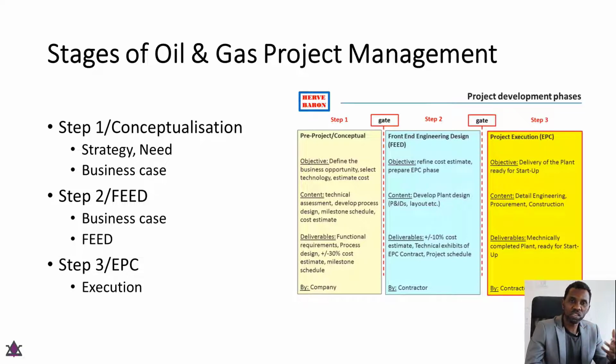There are some projects that require that you send out documents based on the FEED analysis. You send out documents for contractors to bid and send in their own proposals. So they will look at what the purchasing company has requested, and they will provide their own technical analysis and expertise, as well as the cost as to how it's going to be achieved. So these are some things that may be done in this EPC stage.